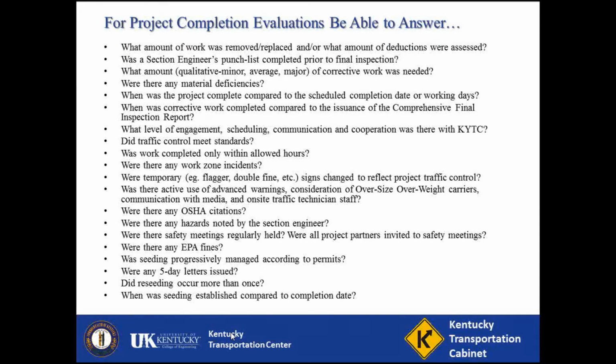Here you see the project completion list with questions to consider, such as: was the section engineer's punch list completed prior to final inspection? Were there any material deficiencies? When was the project complete compared to the scheduled completion date or working days? Did traffic control meet standards? Were there any OSHA citations? And so on.